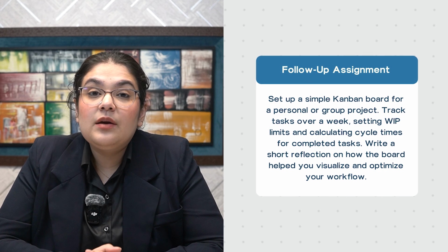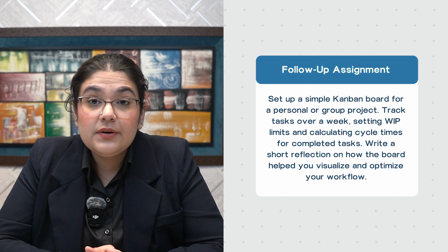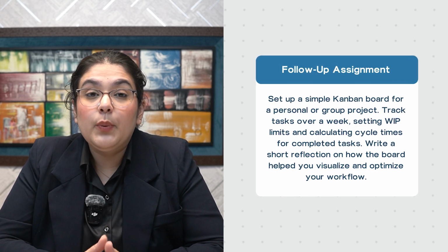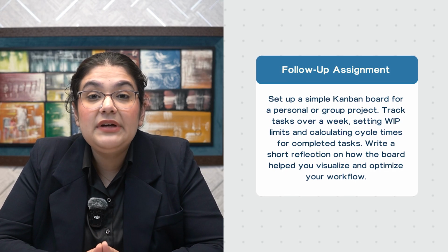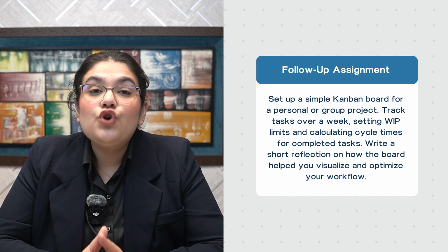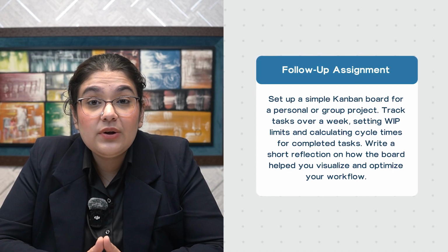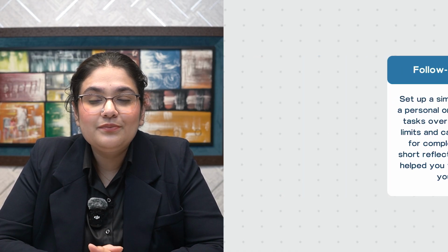Set up a simple Kanban board for a personal or group project. Track tasks over a week, setting WIP limits and calculating cycle times for completed tasks. Write a short reflection on how the board helped you visualize and optimize your workflow.